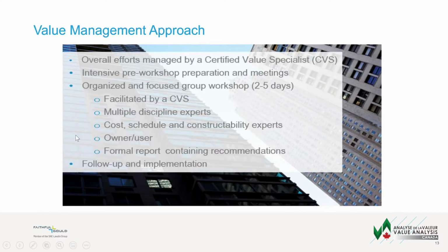And in general, overall efforts are managed by a certified value specialist. We have intensive pre-workshop prep and meetings, and then we have our organized focus group workshop of 2 to 5 days. You know, we all like 5 days, but a lot of clients are pushing more and more for shorter workshops. But in general, they're all facilitated by a CVS with multiple discipline experts.